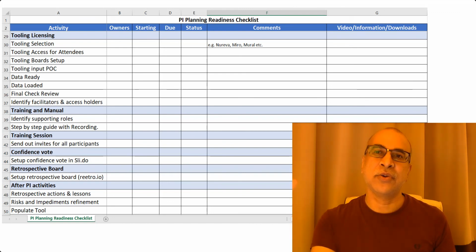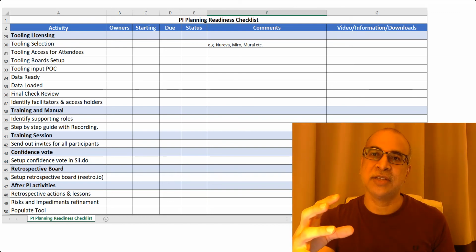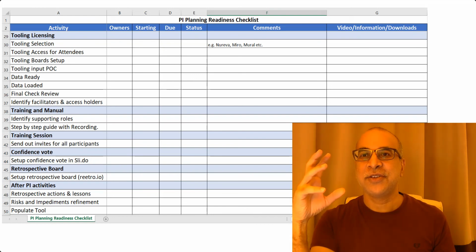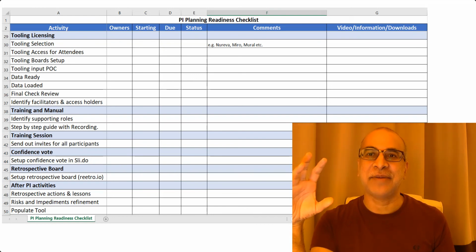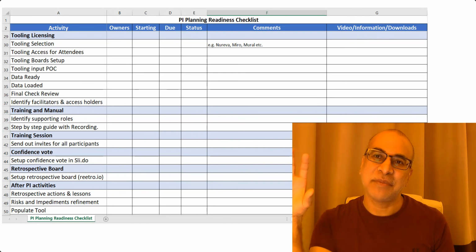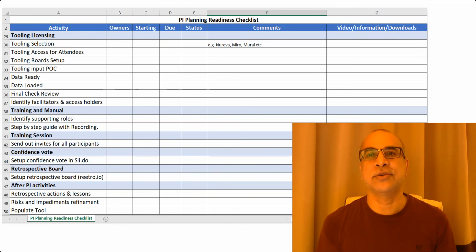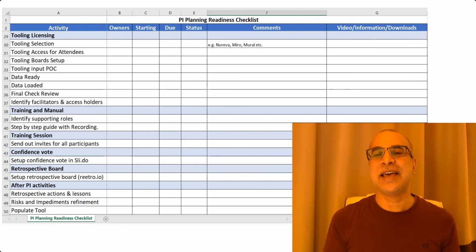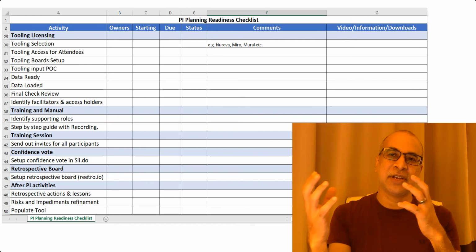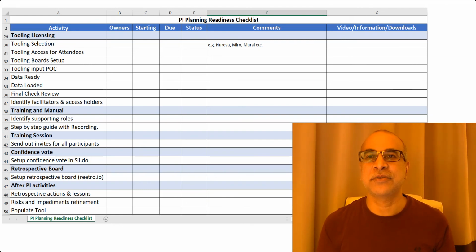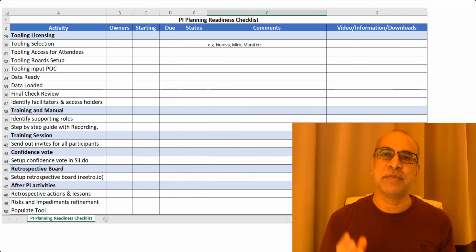during the 1 day or 2 days or 3 days, wherever it is. Then during your retrospective, based upon the votes that have come up, you can focus on the things that are really important. I find that quite useful, especially at the end of 2 or 3 days, when people are like, oh, I don't want to be doing the retrospective now, right? But we should be doing a retrospective. At that point, you can dial it in and have a shorter retrospective, and I find retro quite useful because the voting element means you can have a shorter retrospective.